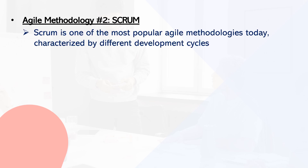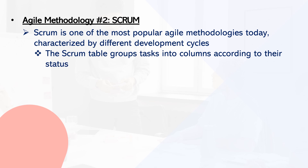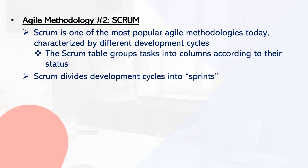Framework number two: Scrum. Agile Scrum is one of the most popular agile methodologies today, characterized by various cycles of development. In many aspects, Scrum and Kanban are comparable — Scrum typically uses a Scrum board similar to a Kanban board, grouping tasks into columns based on progress. Scrum divides the development process into units known as sprints, concentrating on planning and controlling one sprint at a time.